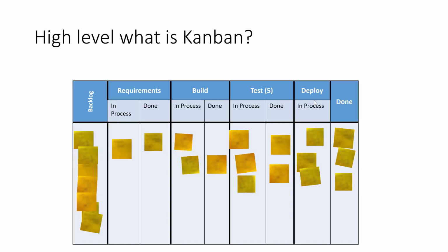So when I'm working with a team, I would rather set it so that you're actually meeting on a regular basis. So do your retrospectives, do some form of planning. You need to look at the backlog, and you need to be working on that and making sure that it's prepped and ready to be developed, right? So you probably would have a column in between these two to actually visualize the real flow of work that you do right now.